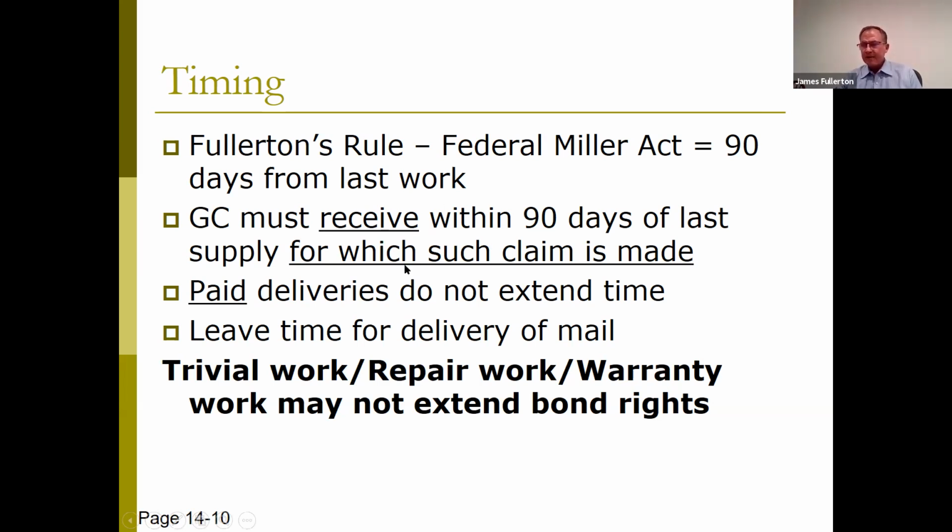Once an invoice is 90 days old, or once 90 days have passed from your delivery, you need to go ahead and send a bond claim. You might even tell the GC and the customer, look, we're going to continue supplying the project COD, and we're going to help make sure this project gets done.